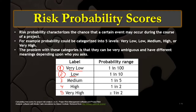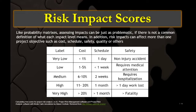But risk has two things: probability and impact. I can also go and try to understand cost. Let's take cost and schedule — if the risk of cost increase is less than 1%, the impact on cost is very low. The schedule may be one day, not making much difference. Of course, you have to consider here if it is on a critical path or outside the critical path, and things may change a little bit.